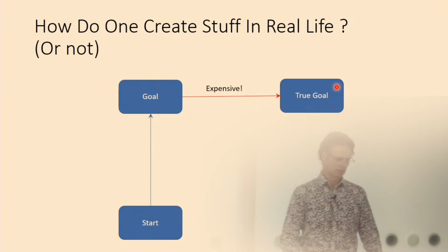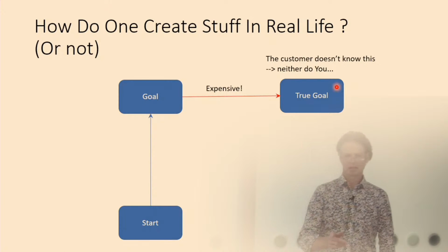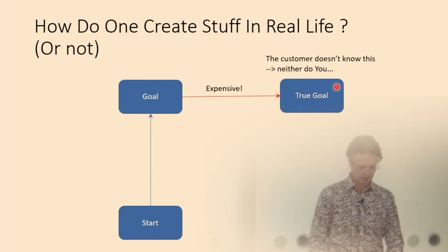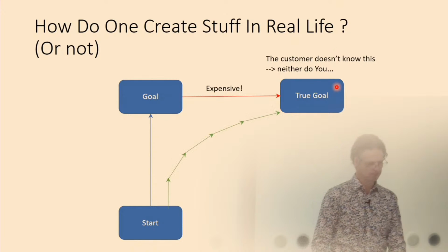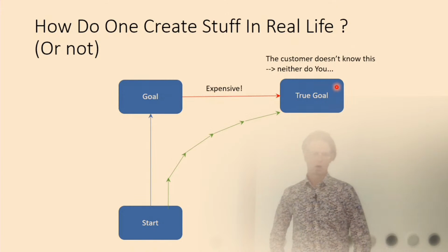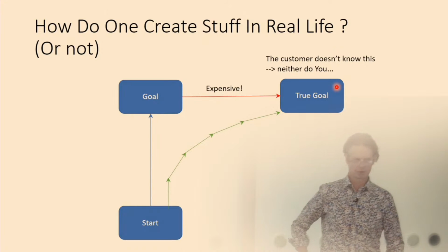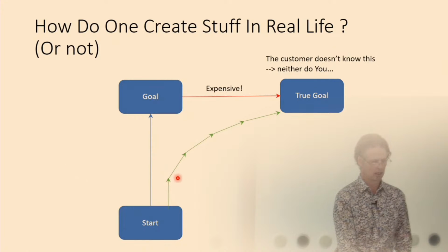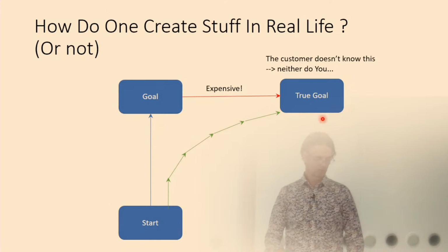So what you try to do is that you do it like that. Oh, sorry. That's another part. If you're building a house for your customer, they usually never understand what they want. So take that with you. This is what you are supposed to do, most likely. You build a few things, have a deadline or a check-off with your customer, build a bit more, check out, build a bit more, and at the end you are at your true goal.